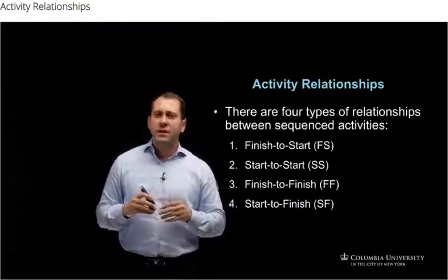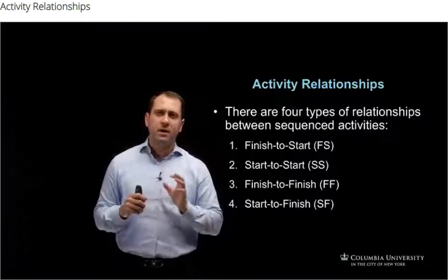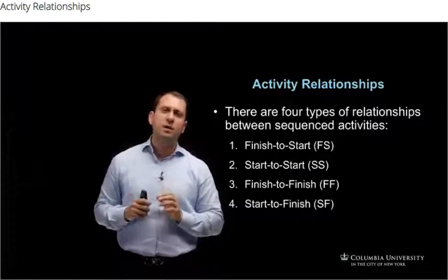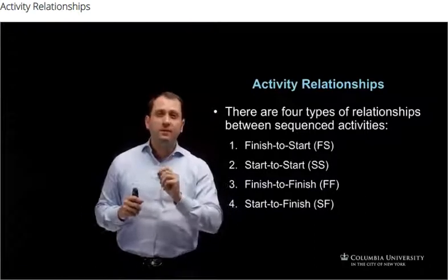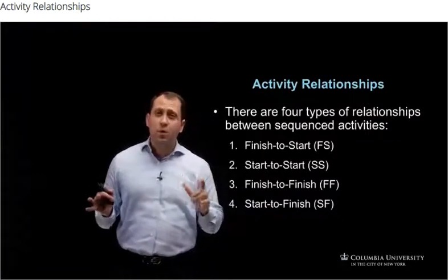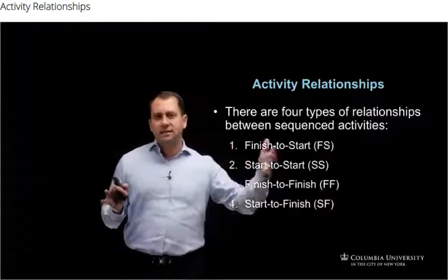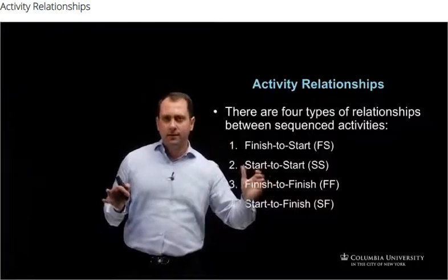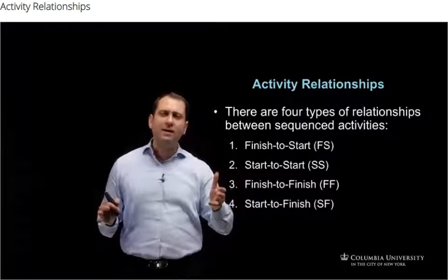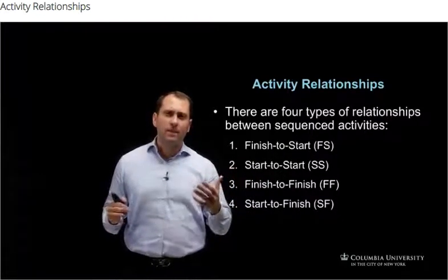The finish to start relationship is actually the most common relationship in our industry, or what we usually call a traditional relationship, which is when one activity finishes, a successive activity can start. And I want to remind you again of the example we gave on the column.